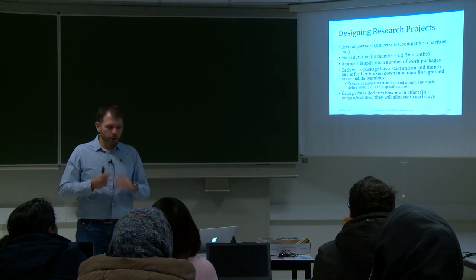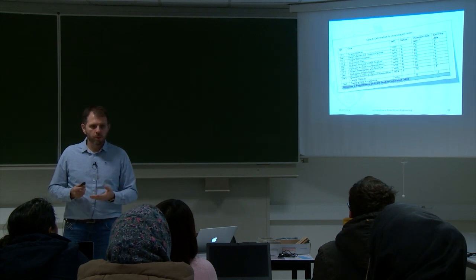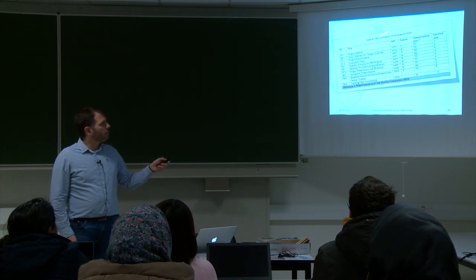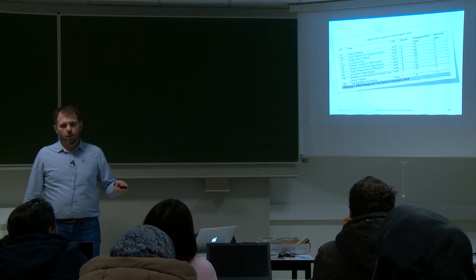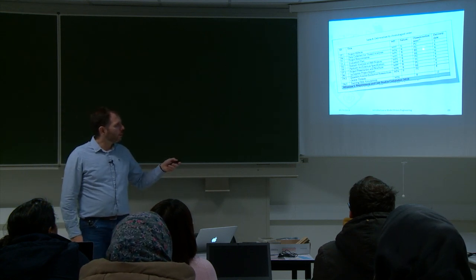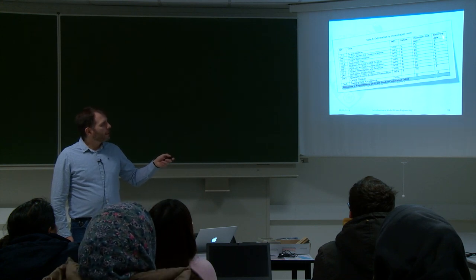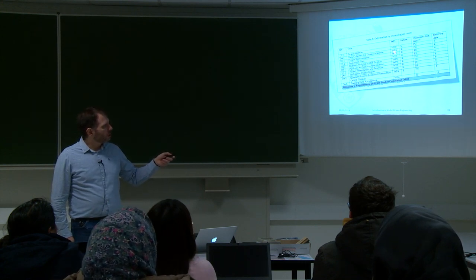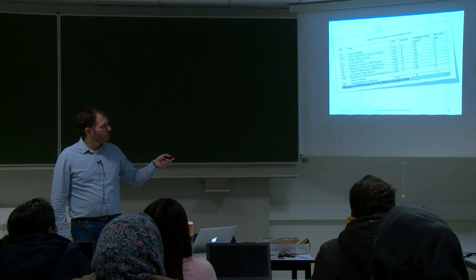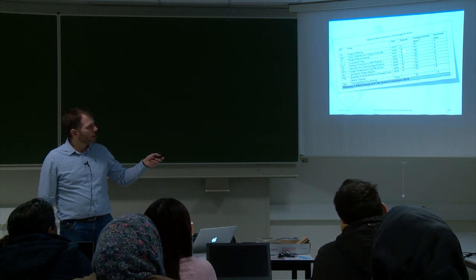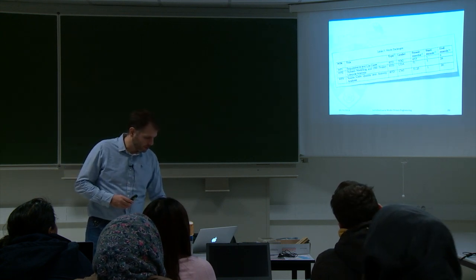So based on this information, we need to produce a number of tables in our proposal document. So we need to produce a table of deliverables by chronological order. This comes from an actual European project, where we see a number of deliverables starting from month 3 and 4 and 6. For every deliverable, we have the work package that produces it. It has an ID, a title, and a dissemination level that says whether it's public or restricted, and also whether it's a software or whether it's a report. This is one of the tables we need to put in the proposal document.